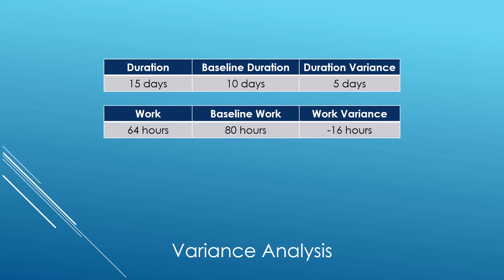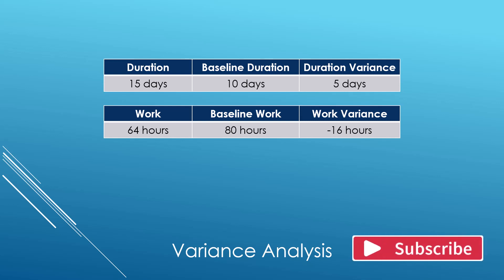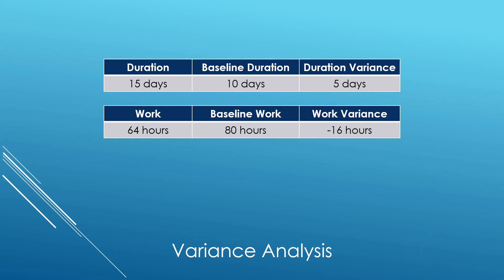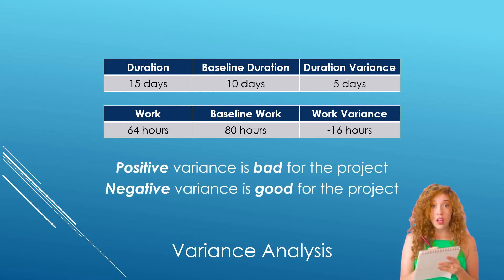Here's another example. The current work for a task is 64 hours. Its baseline work, however, is 80 hours. The difference between the two is minus 16 hours. That means the work is coming in under budget. Remember this. Positive variance is bad for the project, while negative variance is good for the project.